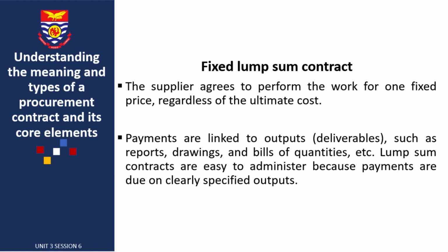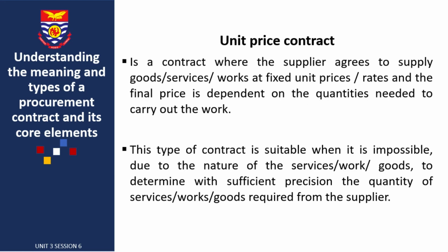Just as we said earlier, lump sum contracts are easy to administer because we just agree on the price, that okay, you charge 1,000 cedis. So no matter what comes up, it is 1,000 cedis you give or you receive as a supplier. Again, we come to the unit price contract. It's a contract where the supplier agrees to supply goods, services, or works at a fixed unit price per rate,